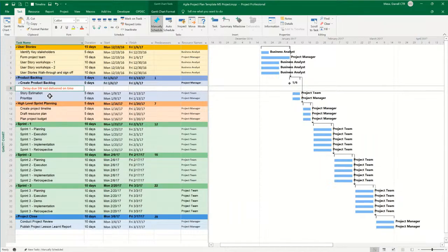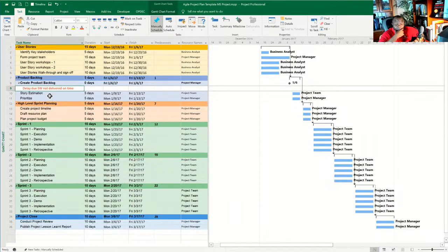So it's not a problem if you assign 6 installers, because it knows it's 600%. So if at the end of the day you're saying 48 hours assigned to installers for a day, the 48 hours isn't going to show as over allocated if you say you've got 6 resources. But if you've only got 1 or 2, then of course it's going to max out. So there are many ways to skin the cat, right, Darrell? There's so many alternatives once you know how to bend the tool, right?